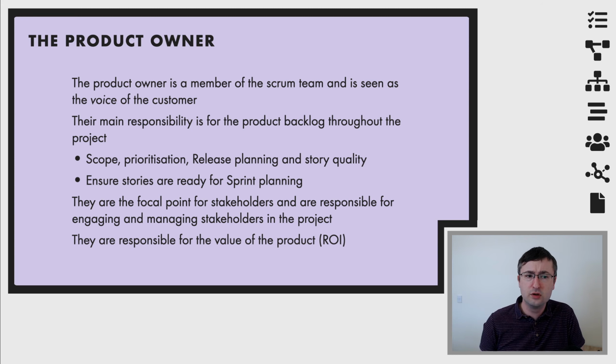So the product owner really is the sole person responsible for managing all of the things inside of a project that are related to the product backlog. They're responsible for clearly articulating all of the items inside of the backlog itself. They're in charge of making sure that the items inside of a backlog are ordered in the best way to achieve the goals and the missions for the customer and for the product that's being created.